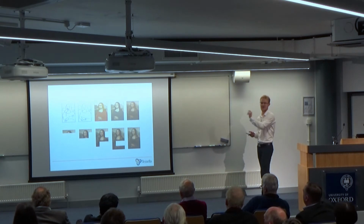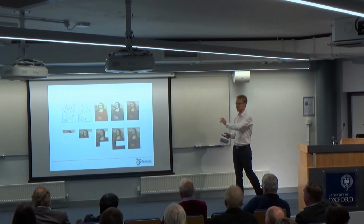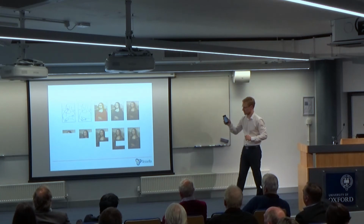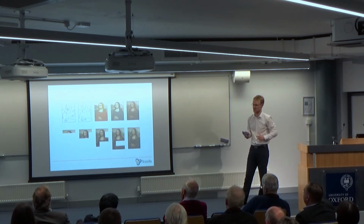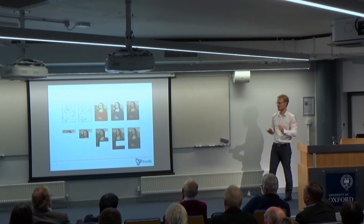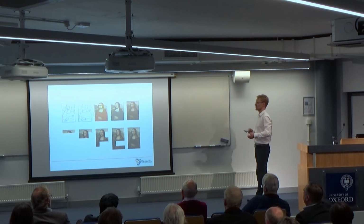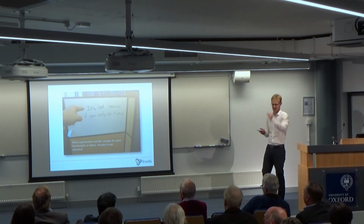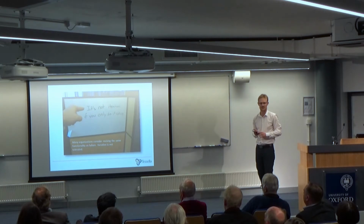They're not iterating, they are incrementing. They're just building it bit by bit. And they've already agreed what the final solution should be, right at the start. Right, in the first picture, it's already been decided how the rest of the picture will look like. And it will be very expensive to change anything. So iterating is the way to go, but most people don't do that. And people say they are iterating, but they are not, because if you ask them, did you do that more than once? They go, no, of course, I've done that task and do the next one. So if you don't do it more than once, you're not iterating.